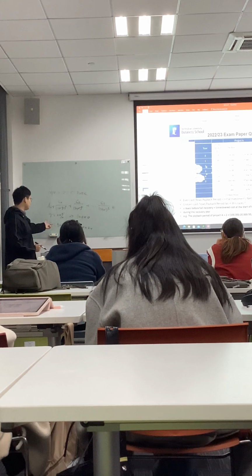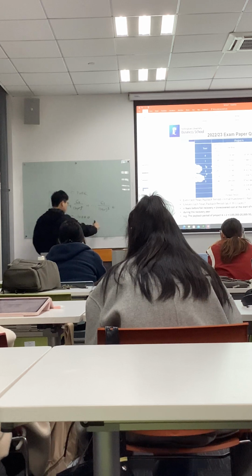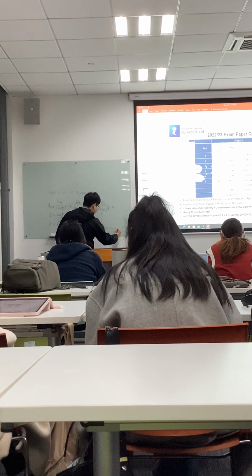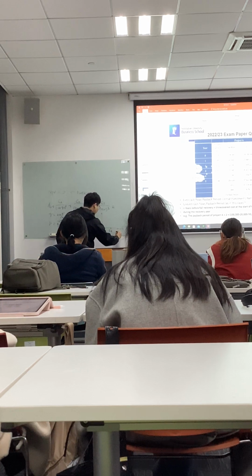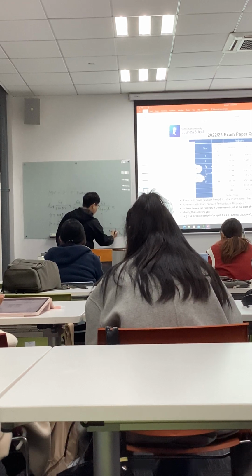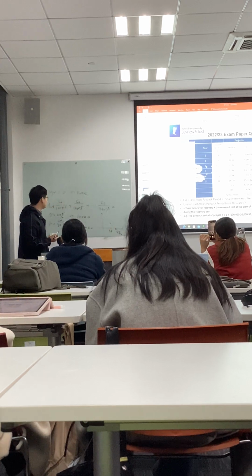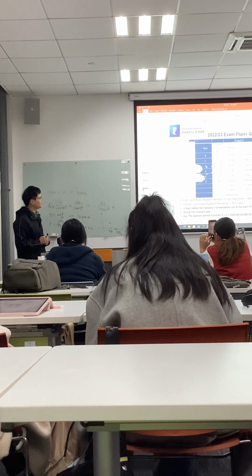So we can, for example, substitute 45, right? And we may derive another one. Then when these two are a little bit closer, for example, between 35 and 45, we have one positive and one negative, right? Then we just draw a figure to identify the IRR, right? So this is how to derive IRR.